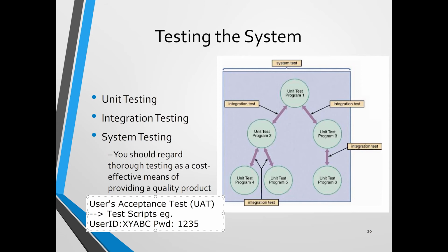So when the users test it already, if there are some minor errors, just ask the programmer to fix it immediately and then ask the users to test it again. If it has passed already, let them go on to the next page